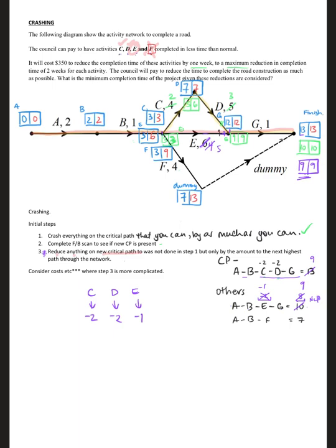Like in this instance, I'd made a reduction by 2, and this had actually gone 8, 9, it only went down by 1. So what I was getting out of it was not what I put in, all right? So it wasn't worth it.